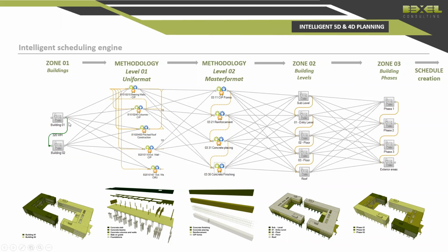At the end, I added these two building zones, which are used for two buildings. When you create your methodology and your items, and then add zones, or mix methodology with zones, you're automatically telling the system to segregate the tasks into multiple levels according to the zones.